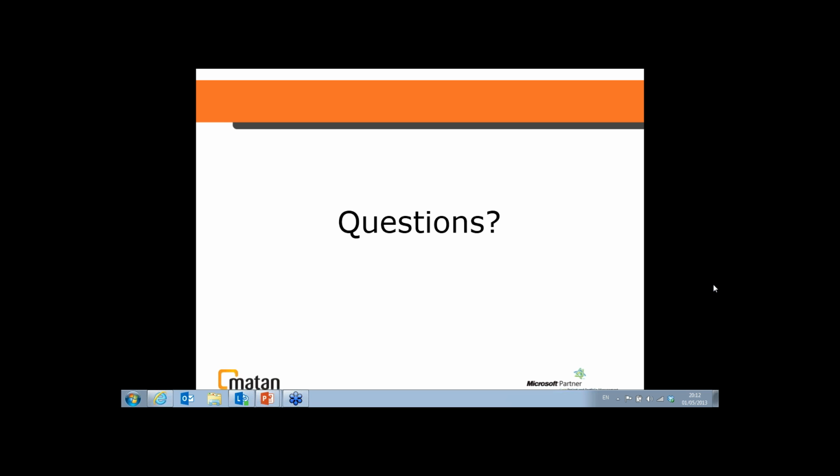I can't think of a way to do that out of the box. The way I would do it is when you open a project file, let's say it's called Project X, and you want to associate a resource 30% of his time to this project file. I would open that project file, have it connected to the resource file, and when you open the resource sheet, go ahead and change the maximum units for that resource to 30%.